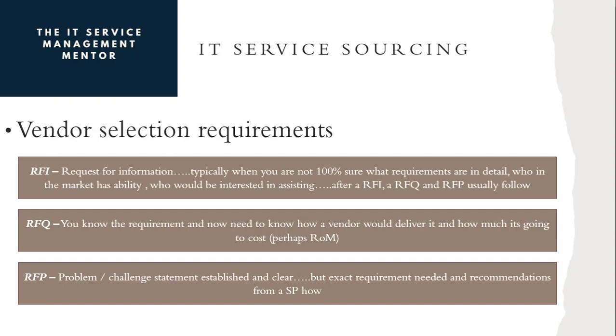RFQ, you usually know what the requirement is, and you now need to understand how a vendor would deliver it, and how that's going to impact from a cost perspective. Maybe there's a rough order of magnitude that may follow, to say an indicative costing is going to be within this area, plus or minus X%.